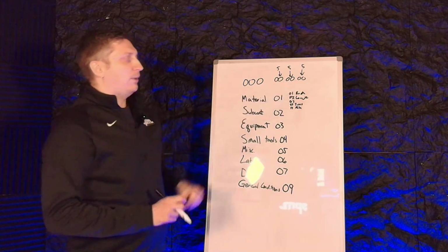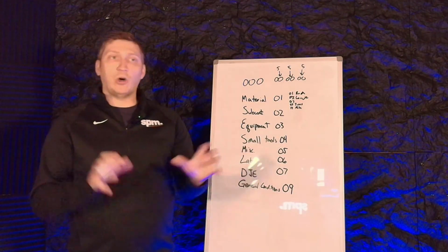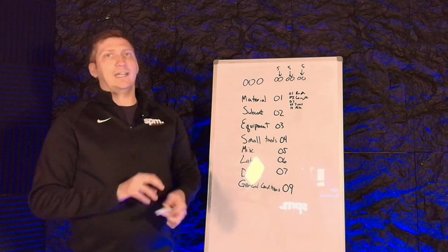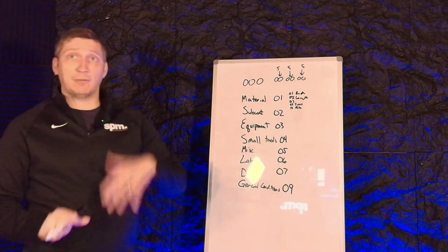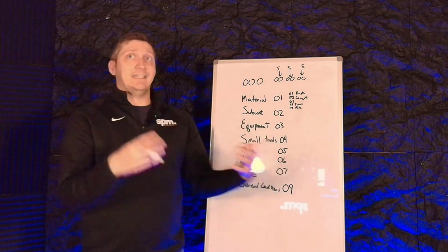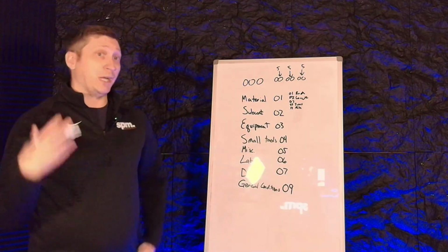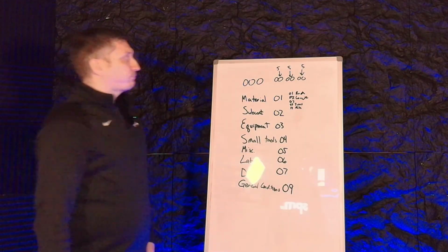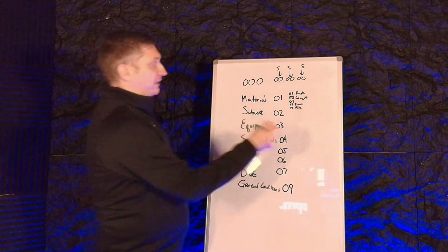On this job, I'm going to add up all of my costs, all 57 stone, or all of my rock material. And I'm going to put on there, it's $500,000 for this. And I'm going to write a purchase order, $500,000 for that. I'm going to track it against it. And if it starts to go over that amount, I'm going to know that there's a problem. Or if it's trending, I'm going to know that. So that's why we track it like that.